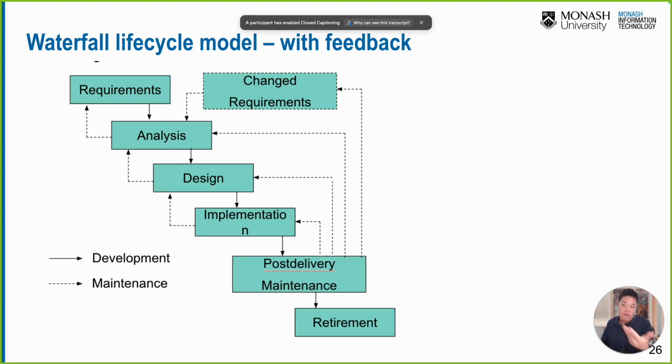It's called waterfall with feedback, right? Let's say once we do the requirement, we do the analysis, and then decide implementation, post delivery, maintenance, and then we try to get the feedback from the clients. The feedback will go back to here, to here, to here, and maybe we can start everything again from scratch, right? But still, it is too expensive. Because once the requirement is finished, the analysis is done already. If the requirement changes, we need to change the design, implementation, and everything. And it is too costly.